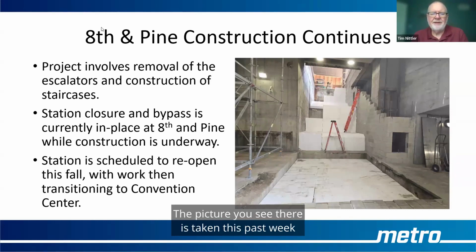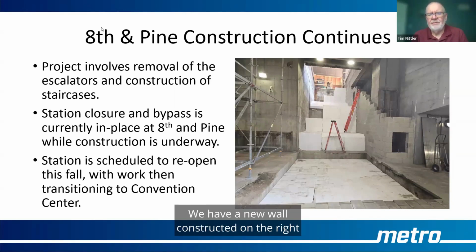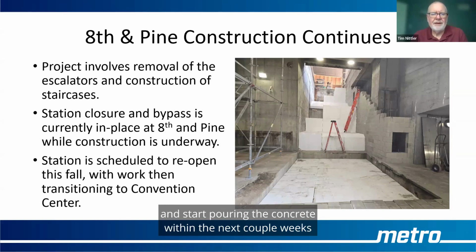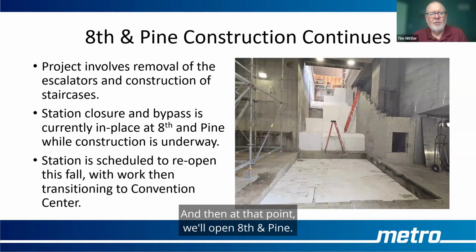The picture you see there was taken this past week, showing some of the progress. We have a new wall constructed on the right, and we have some lightweight fill blocks going in. We should be forming up that staircase within the next week and start pouring the concrete within the next couple weeks and get that station up and running again sometime, hopefully mid-October-ish. And then at that point, we'll open 8th and Pine. However, we're going to transition our construction to Convention Center.